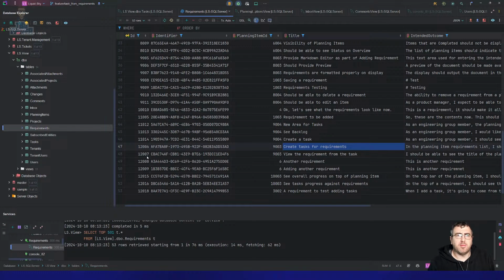Contracting, you're given a large timeline. 3 months will be short. 6 months is pretty safe because you'll be finding something crappy out in 6 months. 12 months usually isn't an acceptable answer. Well, you start saying a year, people get, yeah. And again, I think we all understand that the further out you go, the less specific things are. And that's the point of the t-shirt sizing, right? Throw an estimation down there so that you can kind of put it in place without worrying too much about it.